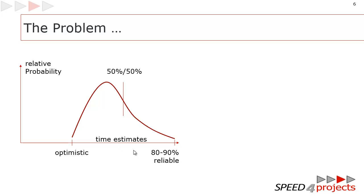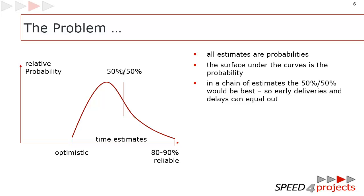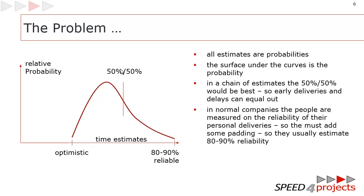But from the point of view of project planning, the 50/50 would be more interesting. This is the point where the chance is 50% that it's earlier and 50% that it's later. If you have a chain of dependent work packages, these delays and early deliveries equal out. But normally, because we are measured on reliability, we add some padding, and that's normal. That's by the way fine.